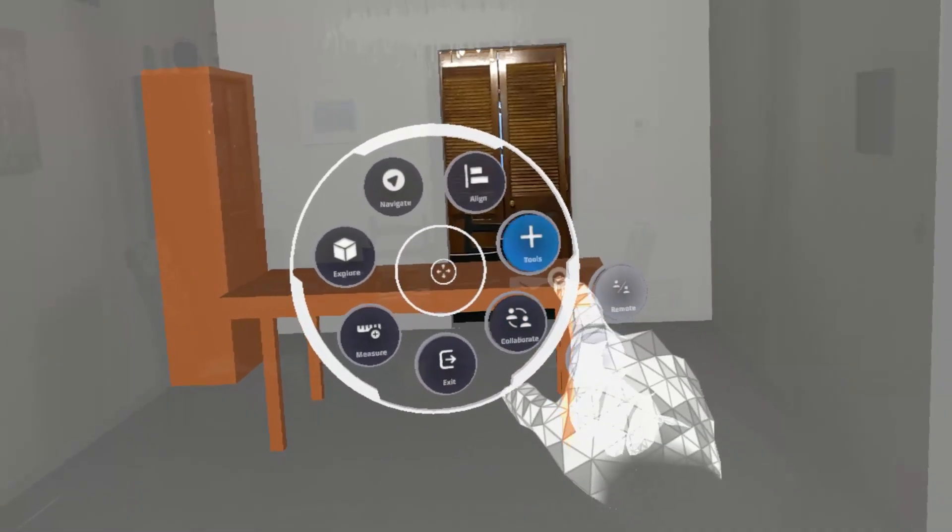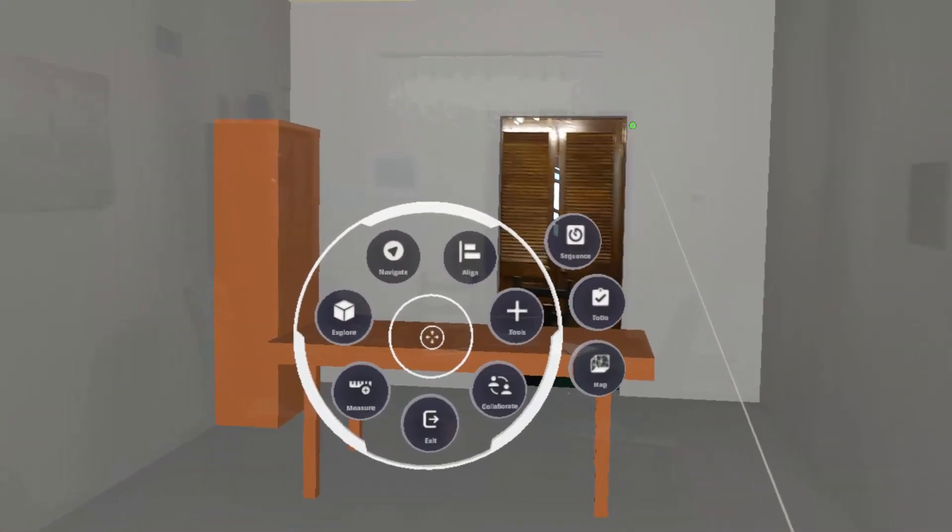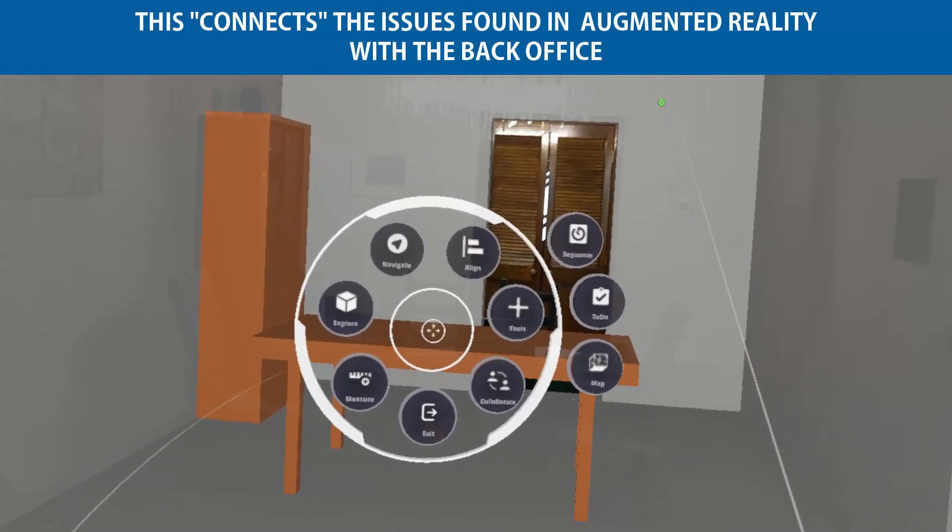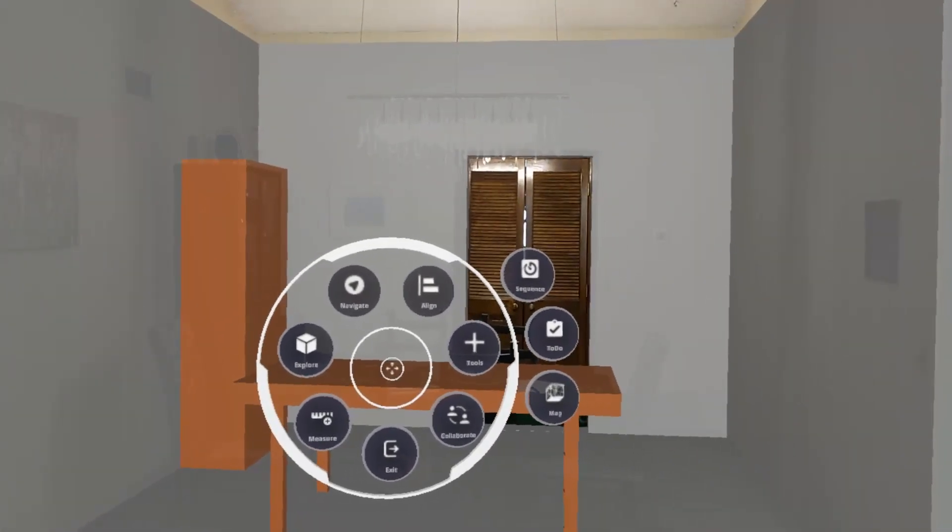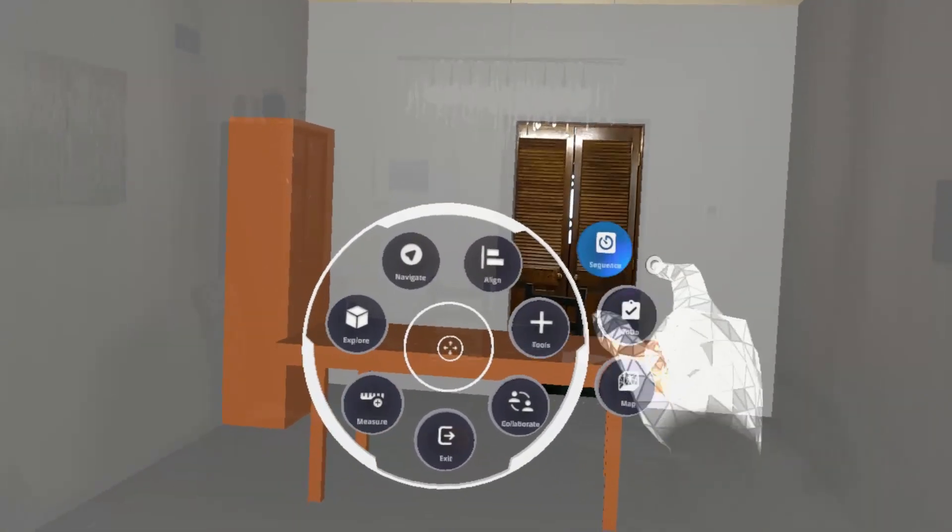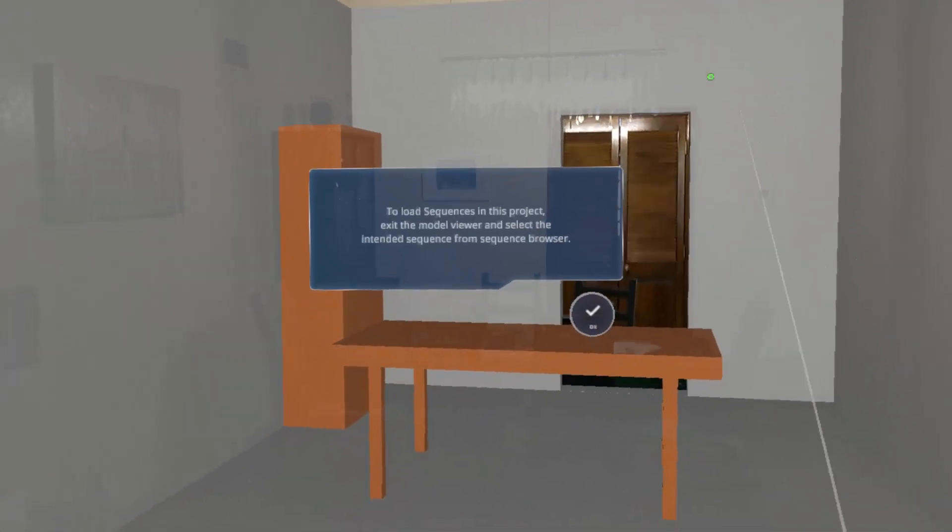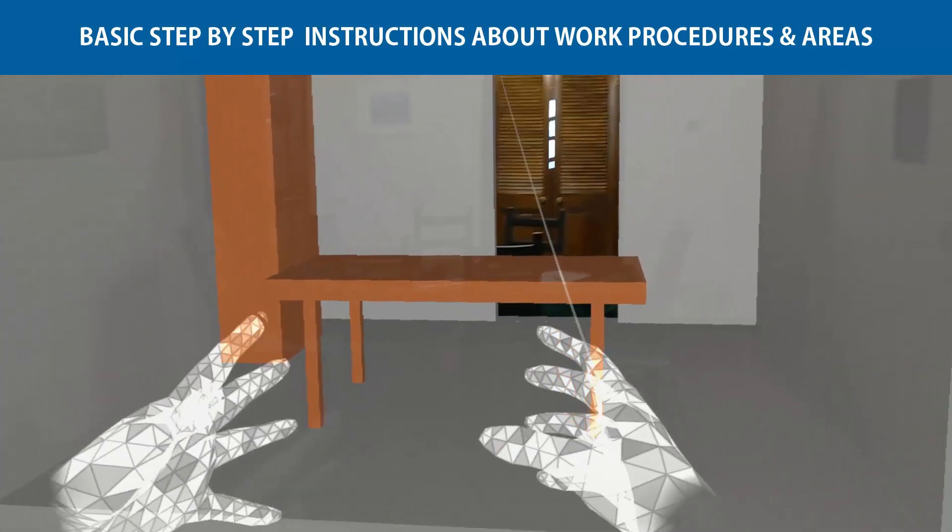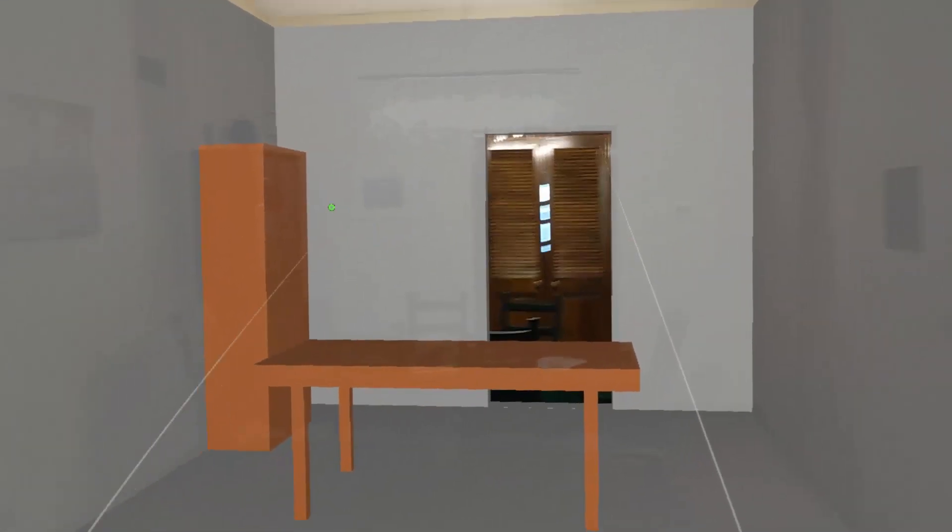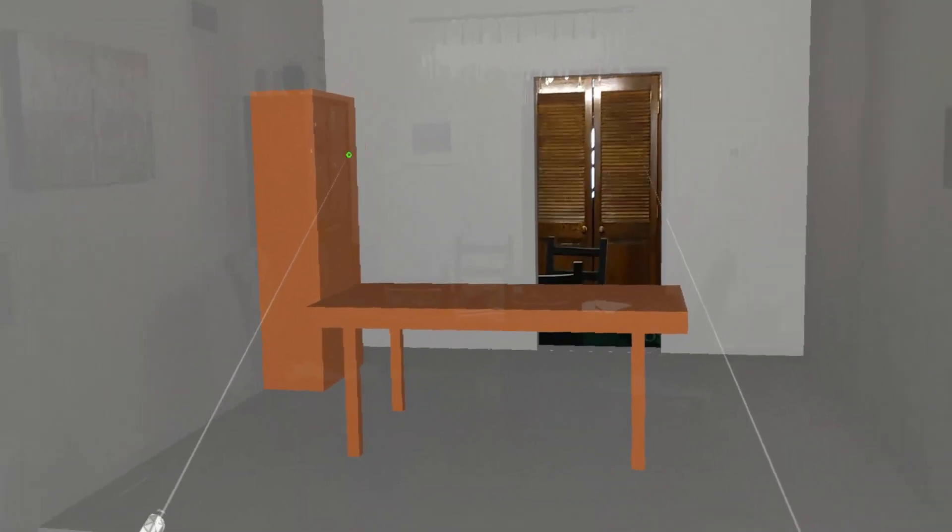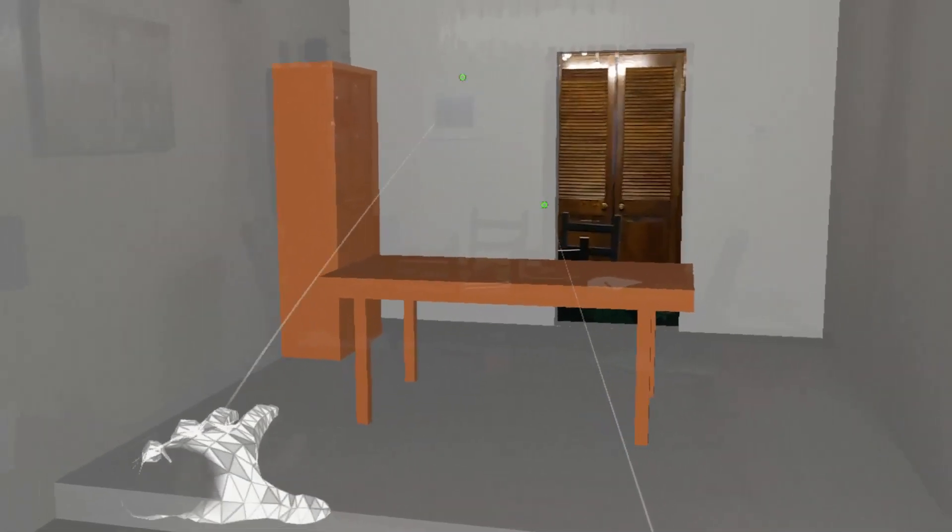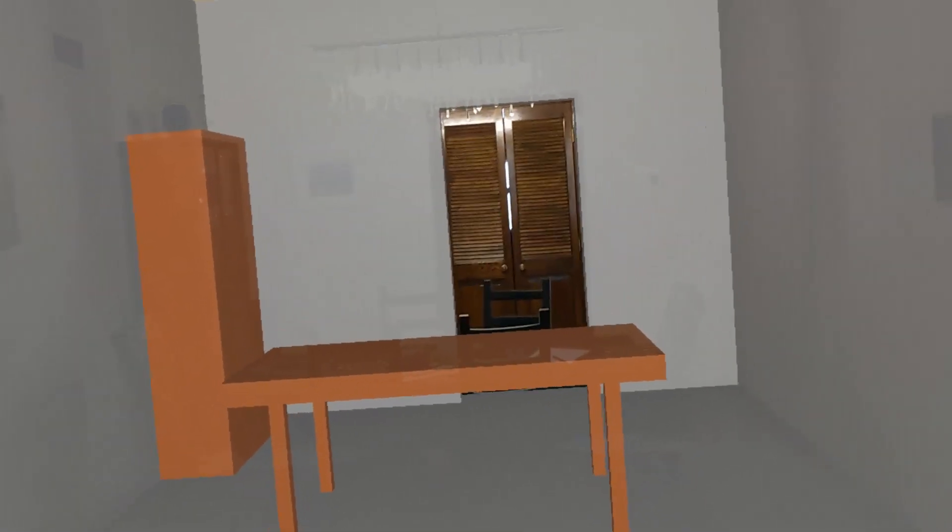There's all sorts of really neat tools as well. Like you can do to-dos, which is basically kind of like issue tracking and things like that and tie that back to the desktop software so that we could send problems or field issues and questions back to either the job site trailer or the design office. And then what's really cool too, is there's a sequencing option. I haven't really set that up here. But basically what you would do is you could sort of show an animation, like a 4D step by step with some instructions and kind of saying exactly how a build order is or certain instructions for trades. Let me give you a good example of where that makes sense: work packages. So if you have daily work packages for subcontractors, you're trying to give them sequences of information, show them a workflow of exactly what they're going to be building and doing for that day. That's where sequencing comes in.